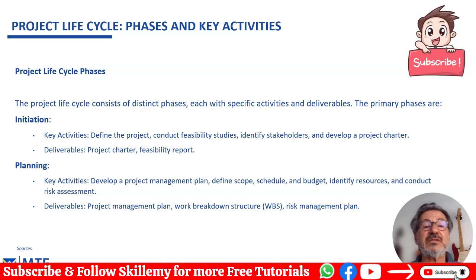So let's look at what are the life cycle phases and key activities of a project life cycle. The project life cycle consists of distinct phases, each with specific activities and deliverables. Primary phases are initiation. Key activities: define the project, conduct feasibility studies, identify stakeholders, and develop a project charter. Deliverables: the project charter and the feasibility report.